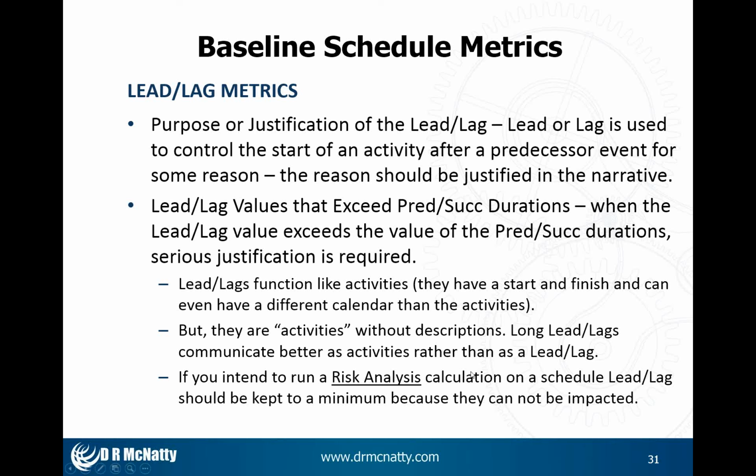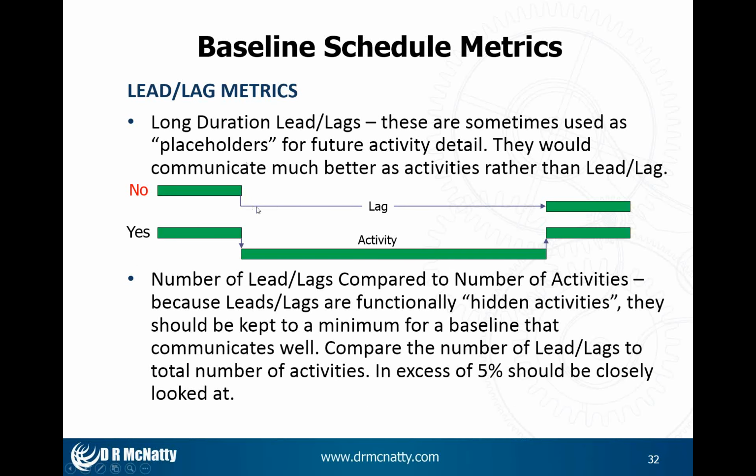And the other problem is if you're planning to do a risk analysis on the schedule, leads and lags cannot be impacted. They can't have a range of durations when you do a risk analysis. So what we recommend is if you're going to use lags or leads to space activities out, especially long duration, it's better to put an activity in there that has a description of what it is. You talk about how the duration was determined, and then this also allows for a range of durations when you do a risk analysis on the schedule. They just communicate a lot better.